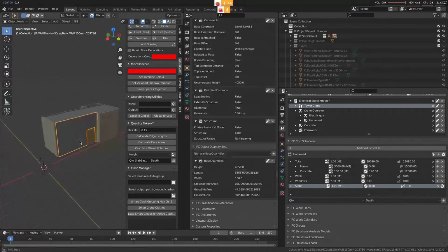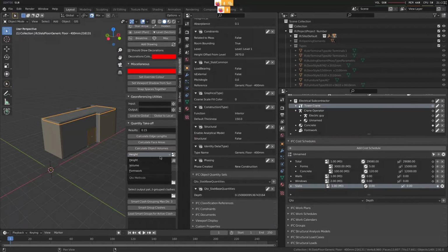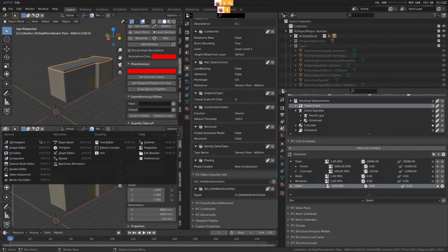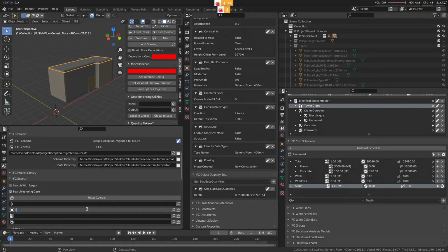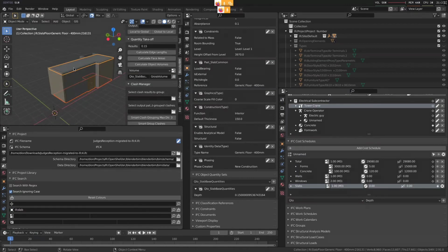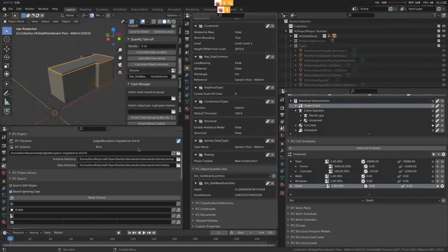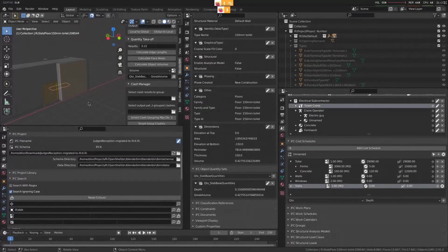And same with volume. So let's say this one has no volume data, and you want to put in the gross volume. You do the exact same thing. You switch to a volume calculation. You select all of your slabs, if I can spell slab correctly. And now I'll click on this, and done. So now all of my slabs have the gross volume filled out. So that's 4.4, and this is 0.42. It's a nice, easy way to do bulk calculations on objects that have nothing.